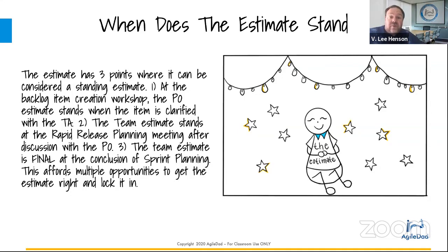Let's see. So if a user story in an active sprint is no longer accurate to its sizing due to new discoveries made by a developer, should it not reflect the accurate size the developer created? Okay, so this is what we're talking about before. The developer in this case should go back to the product owner and say, hey, as written, this story is this size, but with the new discoveries we've made, these extra things are going to have to take place that weren't accounted for. Do you want to add those in as a subsequent story in the next sprint, or is it critical that this is being done in this sprint? And how do you want to address that? This is something that should come up either at a daily stand-up or in a conversation with the product owner to make sure that we have that coverage.